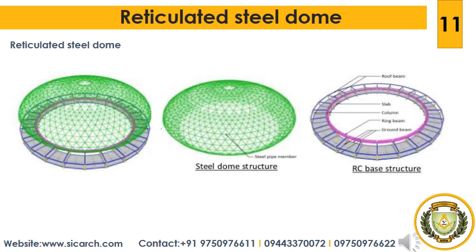The reinforced concrete columns and beams were modelled as linearly elastic members using frame elements, and the RC slabs as linearly elastic shell elements. Construction sequence was: first, the RC circular base structure including piles, foundations, columns, beams and slabs was built; next, the bottom part of the steel dome supported by steel frame shoring was erected; then sets of steel cells were installed completing the first ring of the top part; the same stage was repeated until the top was finished; the steel frame shoring was then removed; finally, cladding was installed throughout.